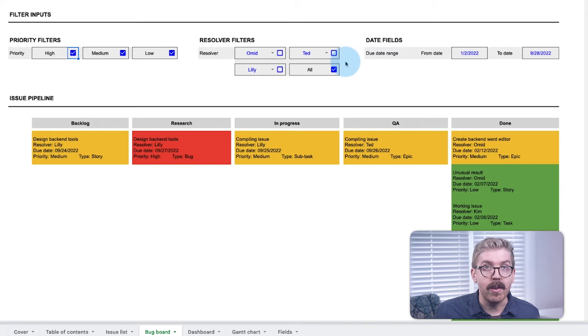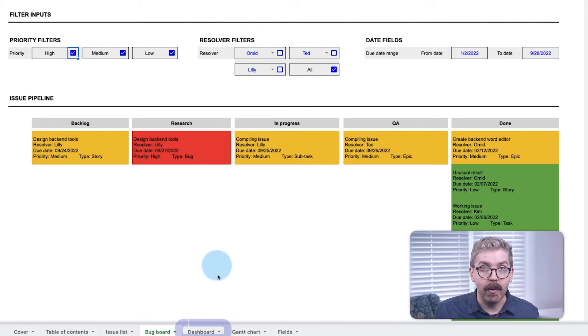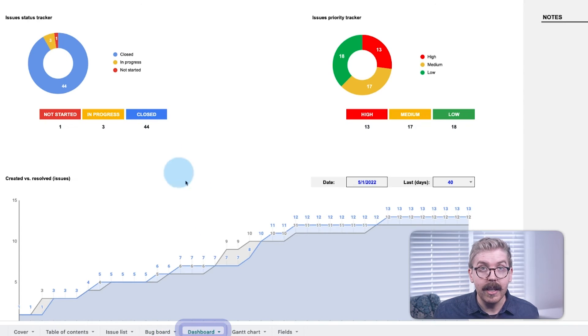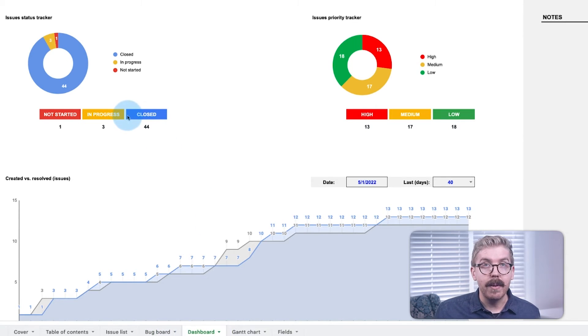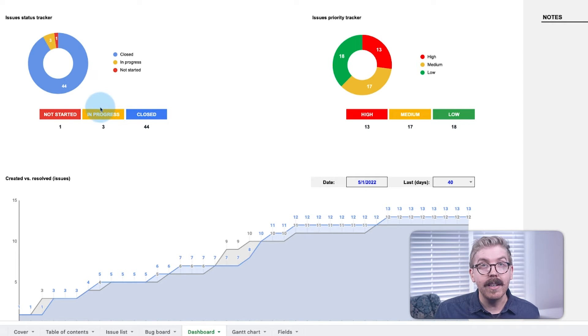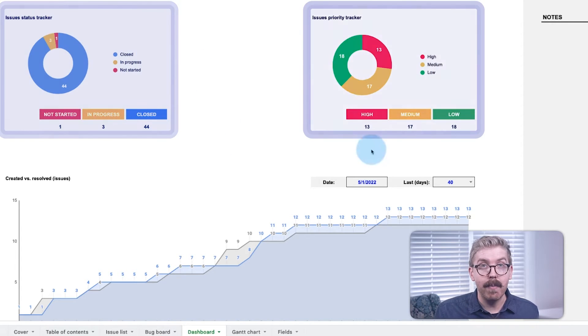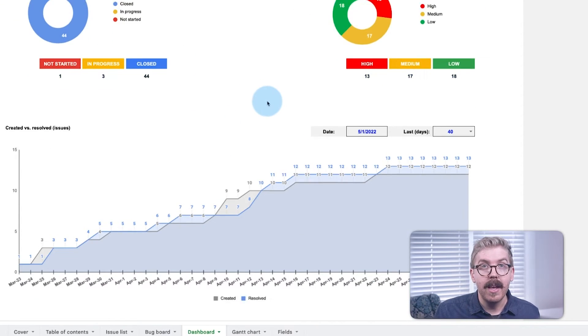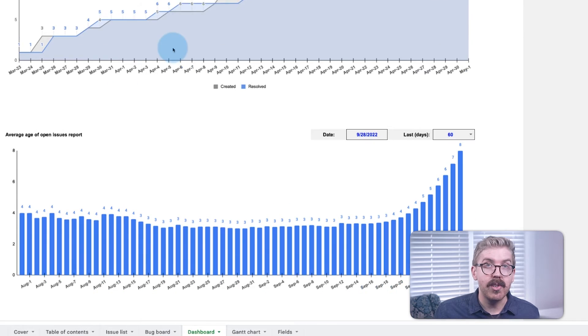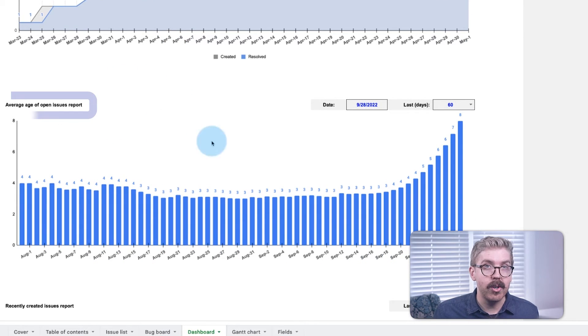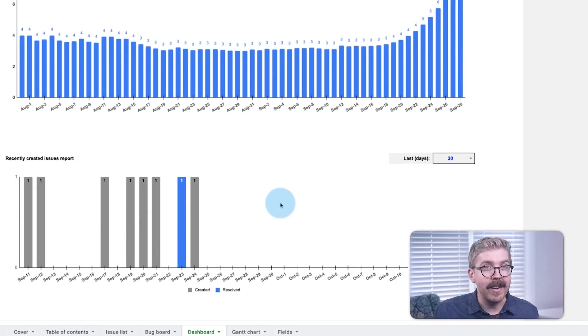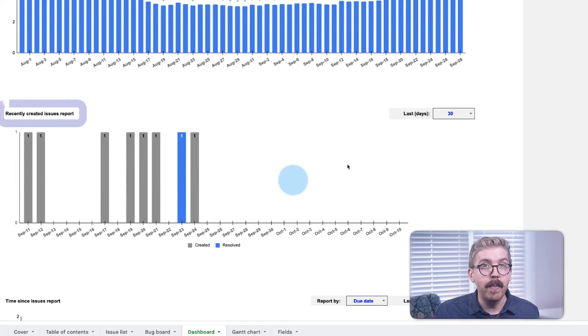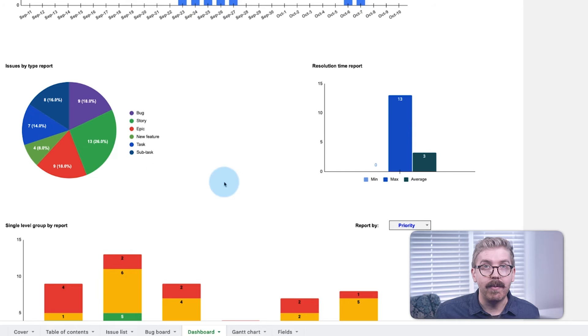Speaking of those, you'll also want to create some sort of dashboard to make issue tracking easier. In our template, we created pie charts to track issues by their status and priority, as well as charts to track issue age, how many of each issue type is open, and all sorts of other helpful metrics for PMs.